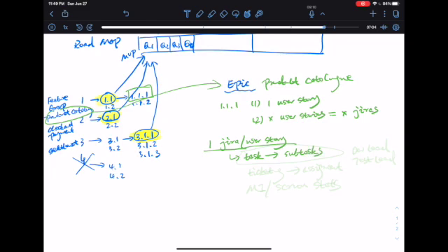So these are usually done by the dev lead after the user story is assigned. So the dev lead and the test lead will create tasks and subtasks and assign them to their team. And as I mentioned, it serves as a kind of ticketing or assignment purpose.